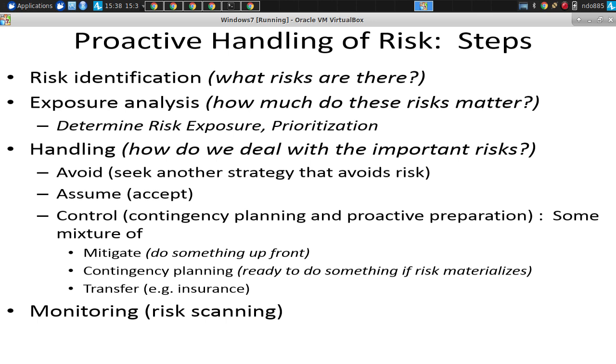But let's talk about some stages and risks that I expect you to undertake for this class. One is identification of risks. Every deliverable, I expect to see a list of risks, the top 10 risks. Those risks will evolve. Risks right now are often big ones with respect to technologies. Risks 2 months from now, when you have that technology learning curve behind you and it has receded into the past, will be a different set of risks. So you need to identify the risks.